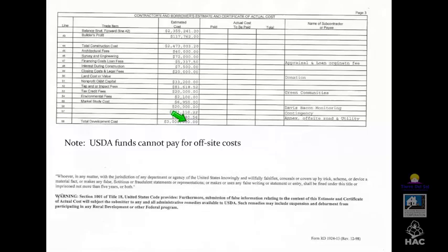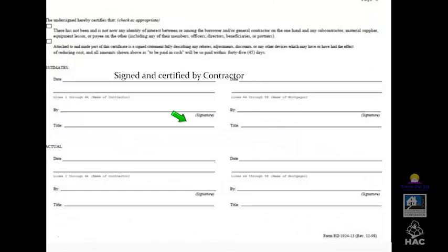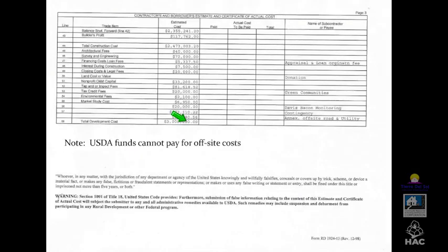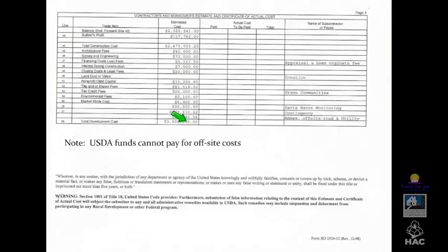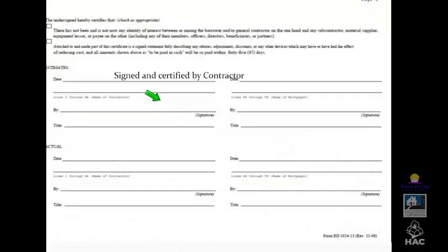Clearly describe in your advertisement when, where, and how the bids are to be submitted, and the due date. Typically what happens on that due date is you have a bid opening. So the bids are due at 5 o'clock. At 5:15, you sit down, say you're a nonprofit, you sit down with your board and the architect, and you open the bids, and it's a public meeting, and you announce those, but you do not announce the winner.